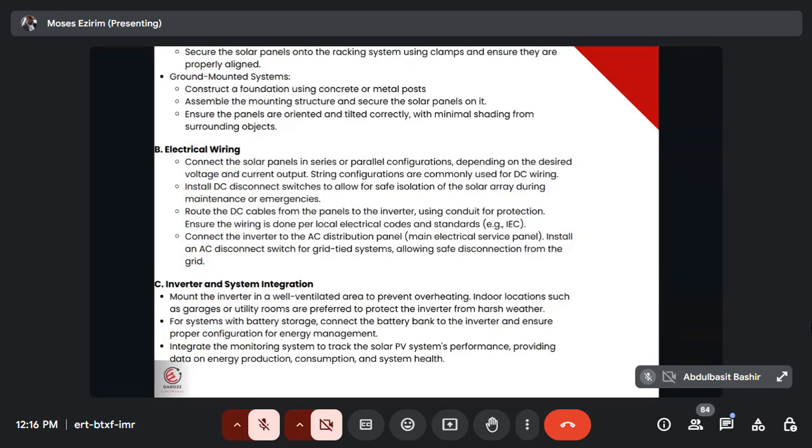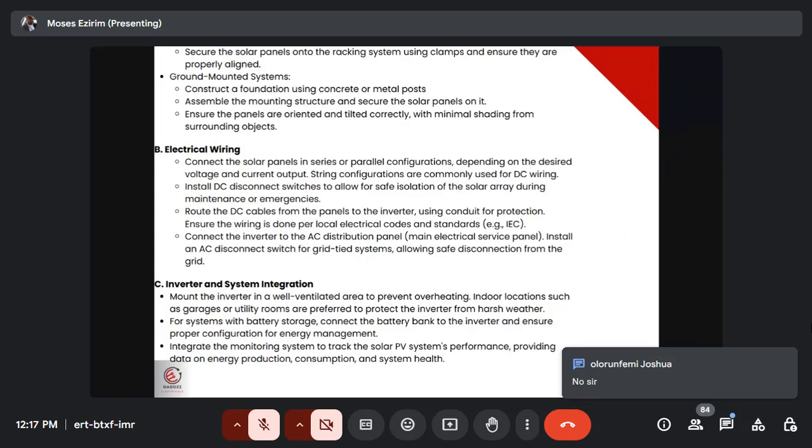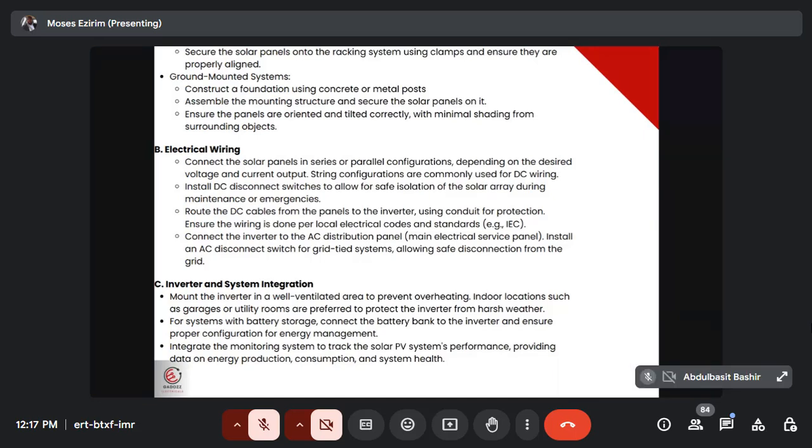So when we get to PVcase, you're going to see where, if you have from your installation 2,000 piles, what I mean by pile is that foundation. Just be seeing it as foundation. If I have 2,000 pile foundations, I can geolocate each of them. What I mean by geolocate is that for each of those piles, I can have their coordinates. All right?